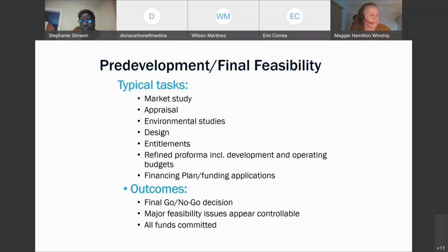I just wanted to add to that, Stephanie, because I've talked to a couple of our class participants about their specific projects, and also inspired by some of our other work together. When you're hiring your consultant to do your environmental analysis, your phase one, it really doesn't matter that much. But if it comes back and says you need a phase two and you think it's probably dirty, like Stephanie said, oh, there's a tank in the ground and it's not out, or oh, there was a dry cleaner here, some kind of obvious indicators, you're going to want to ask questions to your consultant about their experience with brownfields.